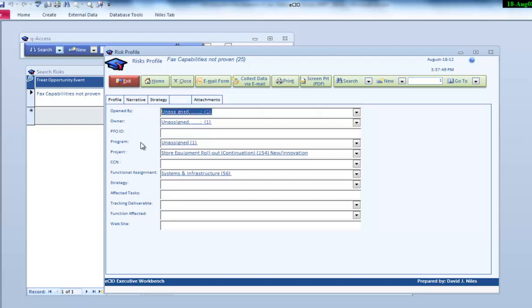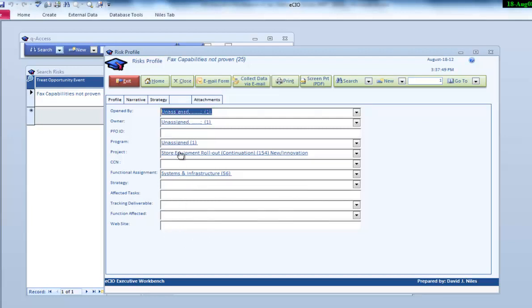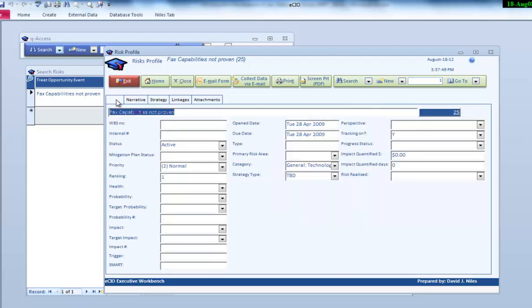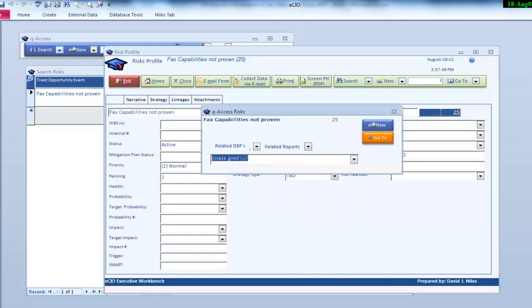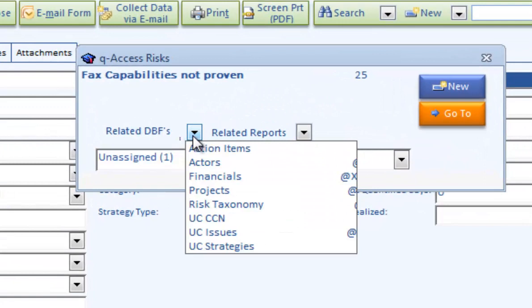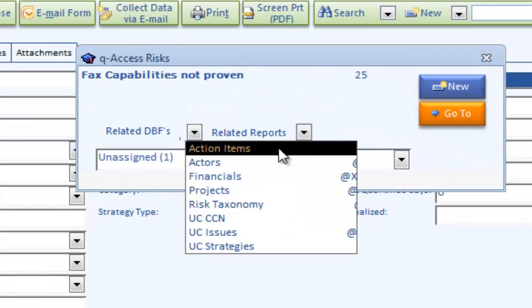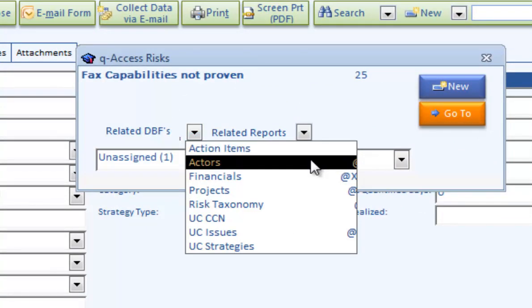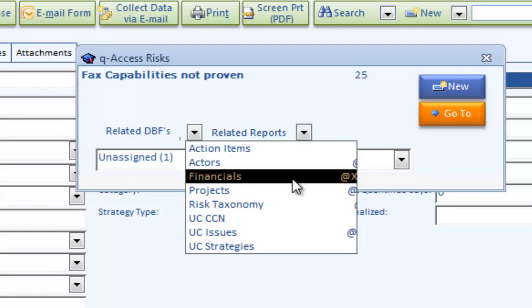We also track who opened it, who the owner is, if it's tied to a project, tied to a change notice, the functional assignment within our organization that owns this, if we want to tie it to a specific corporate strategy, track by deliverable, any of the functions that might be affected, and if there's a website associated with it. We can also log action items, who else is affected by it, and use RACI diagrams.